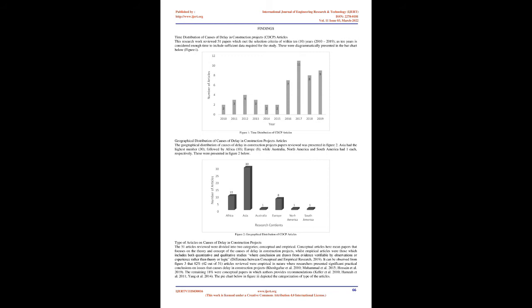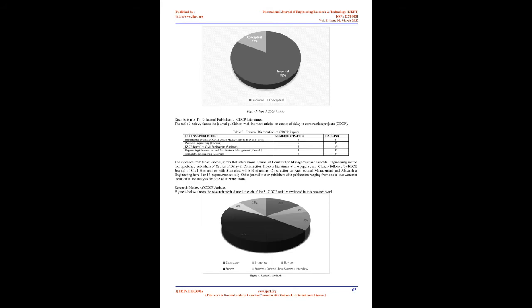Aditya et al., 2017. Review on the causes of delay and difficulties in execution of water supply project in India. The causes of delay were due to delays in administration, land acquisition, planning, and coordination, difficulties in execution, and non-performance of the contractors. Amodi and Ankara, 2017.